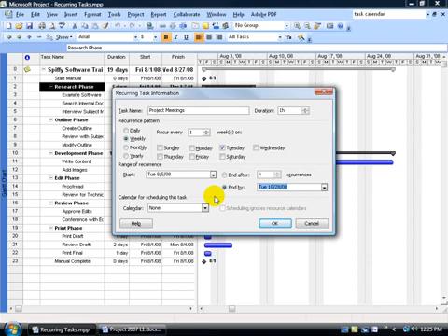However, if I create another calendar and I say, okay, this other calendar is going to be a project meeting calendar, and I select, pretend it's there, project meeting calendar, and I have different days off for different working hours or times, then when I select it here, it's going to take precedence or overwrite for this one task, this project meeting task, the project calendar. So in other words, it's going to ignore whatever calendar I assign to this, the project calendar. So the project calendar can have its own working time, its own days off, but if I create a calendar and I assign it to the recurring task, something different than the project, again, it takes precedence. It'll actually go off of that and not your project calendar.